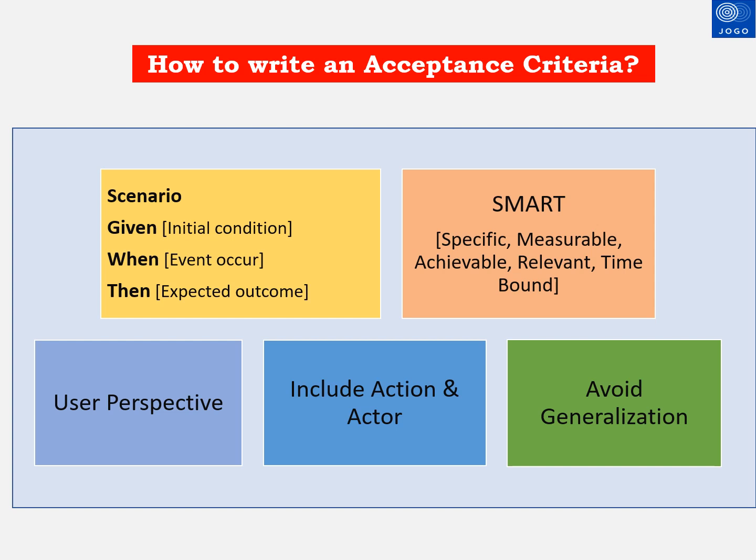Generalization of expectations should be avoided. For example, vague statements like 'performance should be good' or 'user interface should be nice' should not be used. These are all the key elements we should consider when writing acceptance criteria.